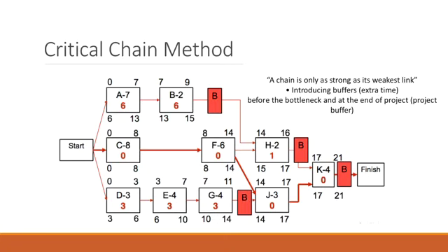Something that I probably forgot to mention earlier is what happens if we have 2 different critical paths. What I mean is that if we have different paths in our project, and the different paths actually add up to the same number. So if we had the same 21 coming from two different paths, then those two are going to become our critical paths. Those are the ones that we're going to analyze the same way, and if we are going with the critical chain method, are the ones that we're going to try to fit with resources as much as we can.